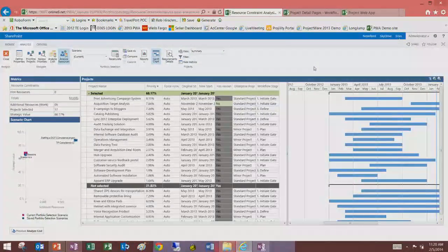And if I have a finite pool of resources and I want all the work to start at the same time, the system's going to help us prioritize that and say there's certain projects here that based on dependencies, based on the resources you need, all that information, you're not going to be able to do unless you solve this problem. So if I think about the triple constraint, what are some of the things I can do? Any ideas? What's that? Yeah, I can move projects out. I can delay them, right? Or I could add resources. Exactly. So we have both scenarios that we can address now.